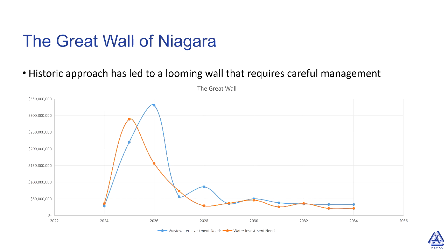And what it does to our operators and maintainers is we're saying to them, yeah, we can't do an overhaul of your treatment plant next year, but just wait 1 more year after that and we're going to fix everything. No need to accelerate your maintenance because it's all taken care of. But the risk we could have is that it might be 10 or 20 years before that plant is overhauled. And if they're not doing the maintenance to keep it up that long, we could deal with some pretty bad failures. So that's where we're changing things.